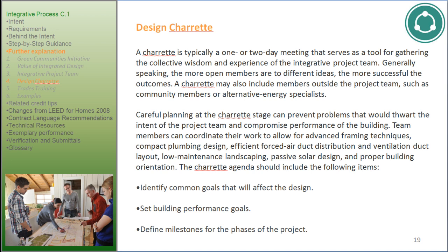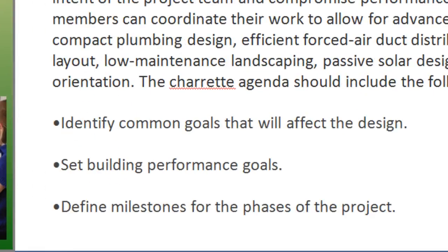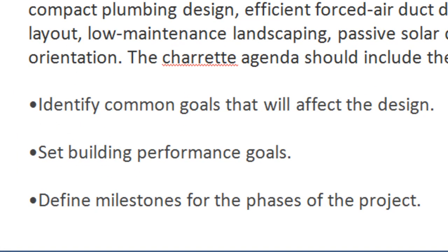The charrette agenda should include the following items. 1. Identify common goals that will affect the design. 2. Set building performance goals. And 3. Define milestones for the phases of the project.